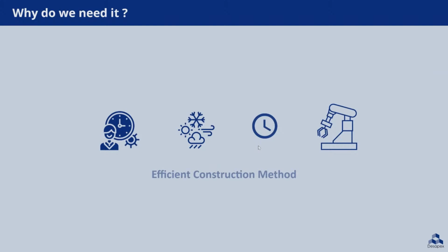This reduces the need to coordinate labor with diverse skill sets who are frequently employed by multiple subcontractors who are required to construct kitchens and bathrooms on site. Because the process of offsite construction is consistent, the time required to finish construction is substantially decreased, making it a more efficient, time-saving, and cost-effective way to build.